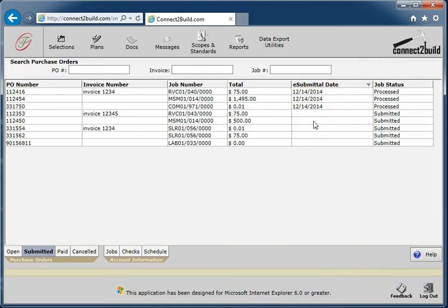And then I don't have any to show you right now, but what happens is then it goes through the approvals. The superintendent will approve it for payment. We also have, on variance purchase orders, various internal approval processes that happen. All of these happen rather rapidly, and by contract, I believe the contract that you sign indicates that you will be paid 2 Fridays after the superintendent approves the purchase order for payment.